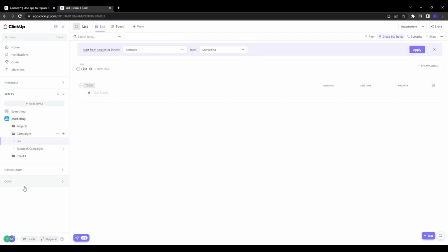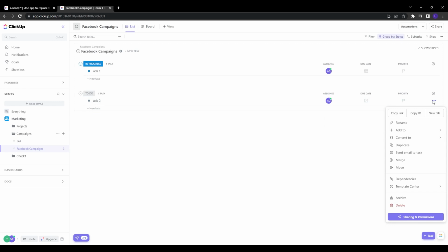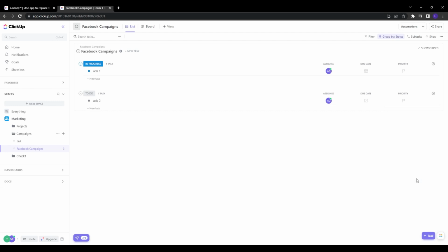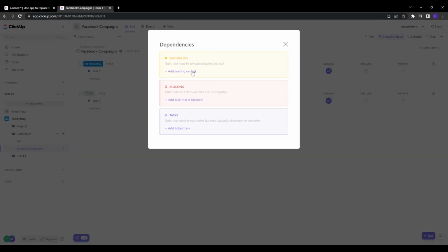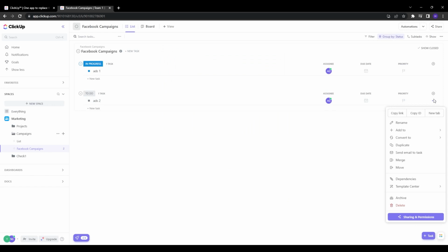And here we can assign multiple people to a task as the primary owner, secondary helpers, and all of that. You can configure custom notifications per assignee. And this is absolutely crucial for collaboration. Don't rely on just one owner. You can also set task dependencies on certain steps that can only start once the other tasks are finished. This is super cool to eliminate bottlenecks.